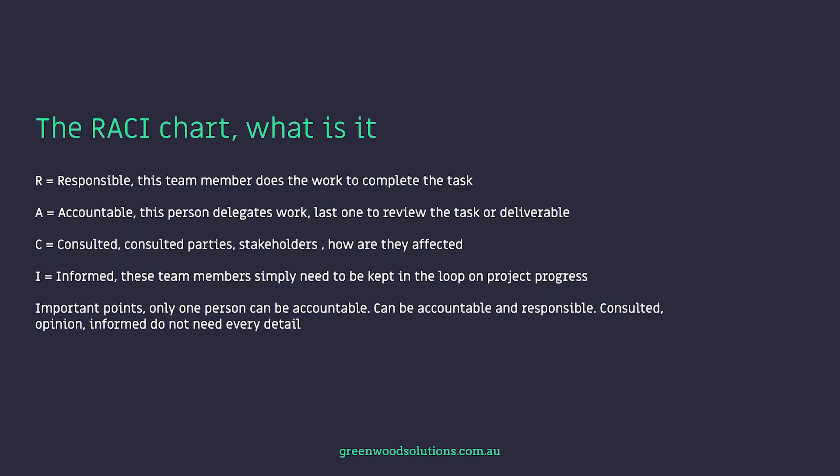There are some rules. There can only be one person who is accountable — in most cases that's you, the business owner, or the person who owns the installation company. There can be multiple people who are responsible, each for a particular task, and you can be accountable and responsible at the same time. Consulted refers to stakeholders — the business owner funding the project, neighbours, or the general public. Anyone with any interest in the project.